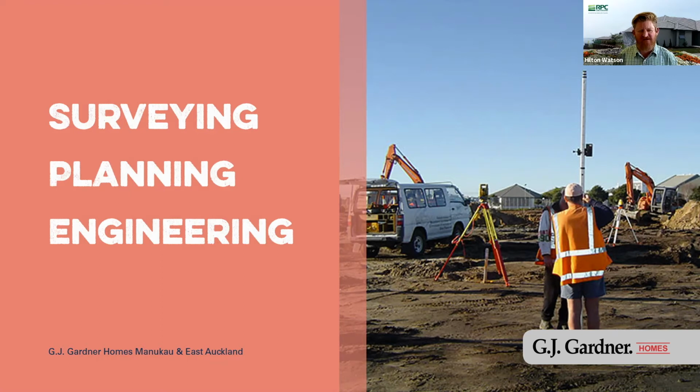Yeah, you're correct. So council sort of split itself into a few arms to manage the demand. The big thing is every new dwelling or existing dwelling needs its own connection to wastewater, stormwater and water supply. So you have to deal with Watercare for the water and wastewater requirements. Auckland Council and Healthy Waters look after the stormwater. Auckland Transport's another key component. They're all about access, working within the road corridor, getting on and off the road. You've also got Vector and Chorus. And yeah, there's a raft of other organisations out there that crop up from time to time.